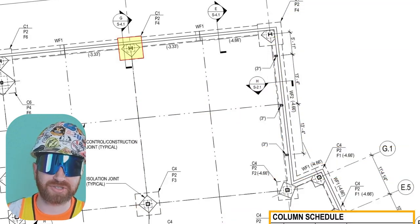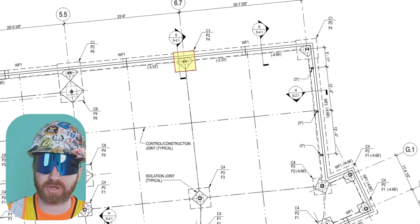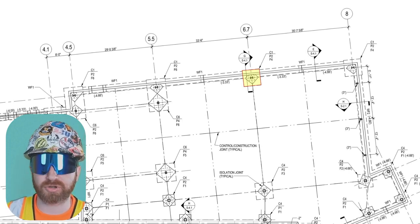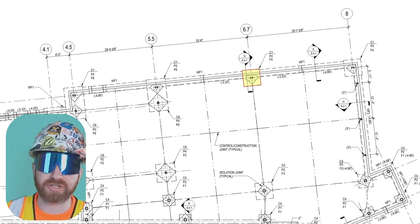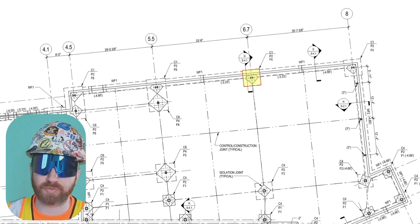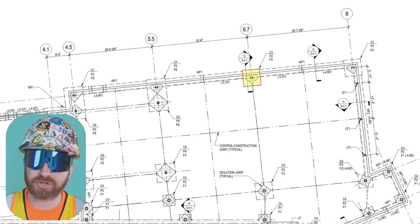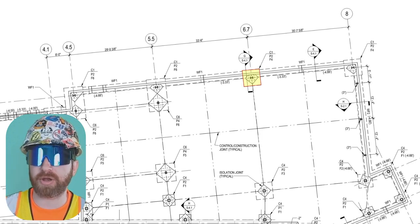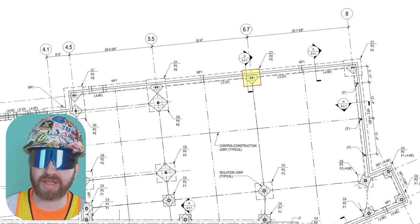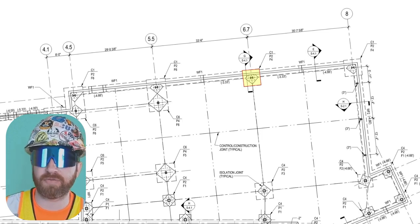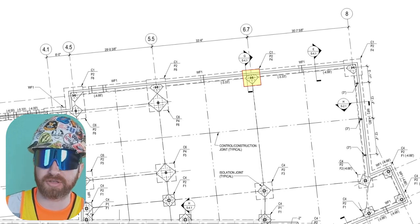You're going to keep doing this process — work yourself around the whole building: all the columns, pads, footings, and foundation walls — to start building this building three-dimensionally in your mind before you step foot on site. Remember, the structural drawings won't show trenching, formwork, waterproofing, or plumbing penetration locations, but they will show how to reinforce openings where pipes go through foundation walls — typically in the form of a diamond box-out — with the structural engineer providing details in the detail section.